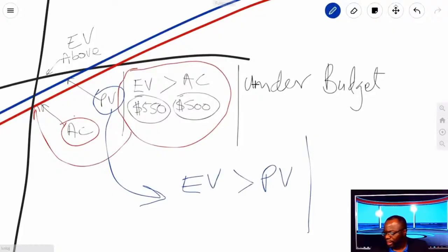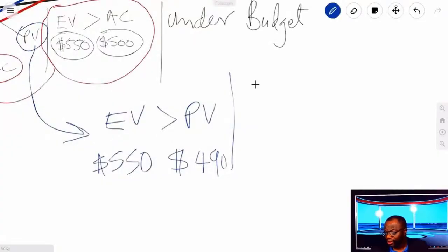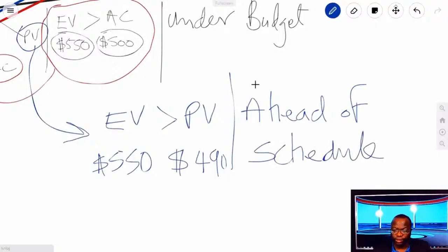In other words, I planned to get $490 worth of work done, but I got $550 worth of work done. See that? And that's good. I planned to get $490 done, but I got $550. I got $60 more work accomplished than I planned. So you are ahead of schedule. And this is good. Definitely good. Okay?